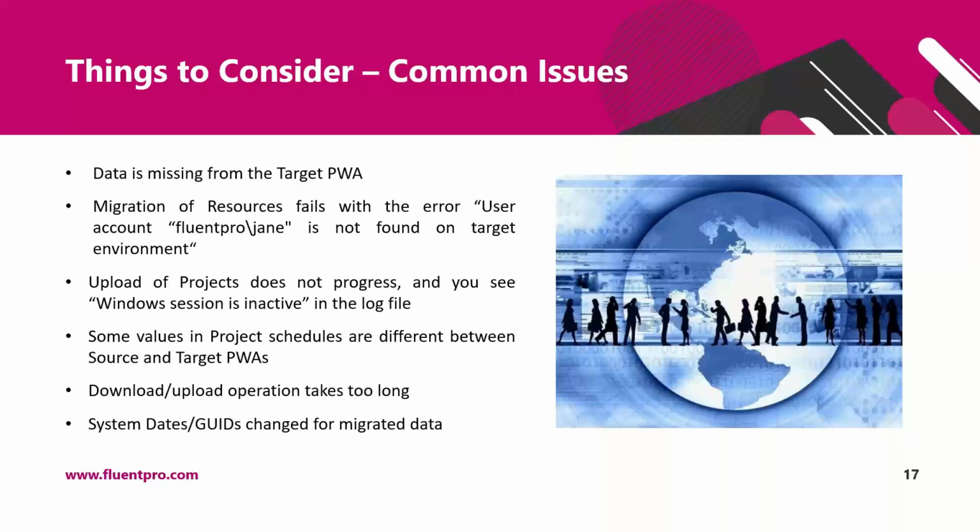For example, if you use a virtual machine for migration and you close the RDP session, this will make your Windows session inactive. For PWA configuration and SharePoint sites migration, it is not an issue. The process will continue running, but for projects migration, since there is an interaction with Project Professional, this Windows session is critical.